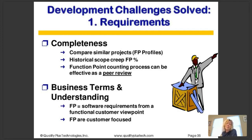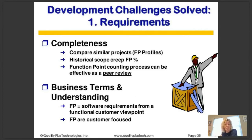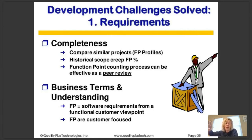If we start building a piece of software with an 18-month schedule, that software typically will grow 1.5 percent per month, according to Capers Jones, a very famous author in software estimation and measurement. Function point counting can be effective as a peer review. When we look at all aspects of the software, we have inputs — adds, changes, deletes (the create, update, and delete components of a CRUD matrix) — and reads would be a query. The function point counting process asks: what data is maintained, what data do we reference, what are my input processes, output processes, and queries? It's all presented in business terms.